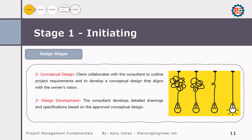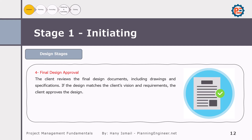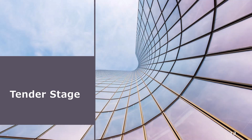In the design development stage, the consultant develops detailed drawings and specifications based on the approved conceptual design. In design-and-build projects, at least the client should provide a conceptual design, then the contractor takes it from that point and starts developing the detailed design. The final step in the design stage is obtaining final design approval — the client reviews the drawings and gives approval to proceed to the tender stage.